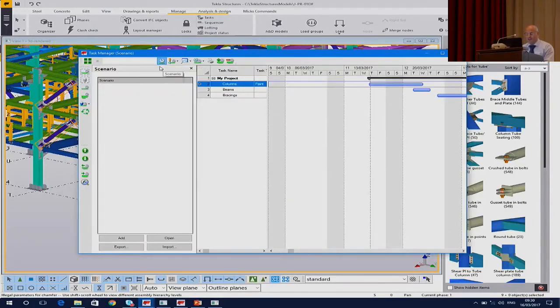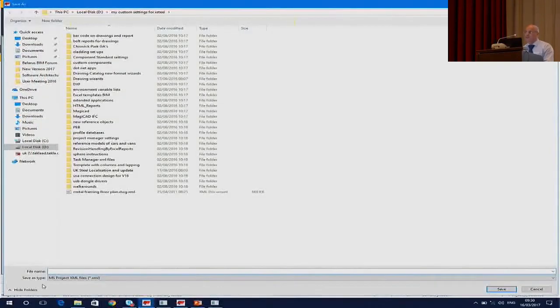And then you can say to that, let's export that out. You can take it out to either Microsoft Project or Primavera, so you can link it to your existing scheduling software as well. So I could now do a schedule saying how long is it going to take me to fabricate that job? Then when I get the feedback from Steel Projects and FSHEP, it will give me the actual timeline. Then I can compare the two. So you can have a schedule, and you can have the actual. So you can get the real calculations for the job before and after.